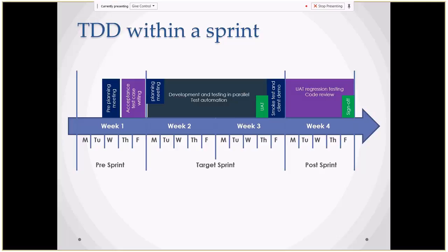But there are situations where there can be issues because of the integration, and from the previous code. So if we find a critical issue, our production will be cancelled, and we will see if we can inject it into the current sprint. If not, the next immediate sprint. But for the medium and low defects, definitely the next immediate sprint, not the current sprint. As soon as the developer completes the task, we mark it as done. Then the QA person will pick it up and do the testing in parallel, in the middle of the sprint.